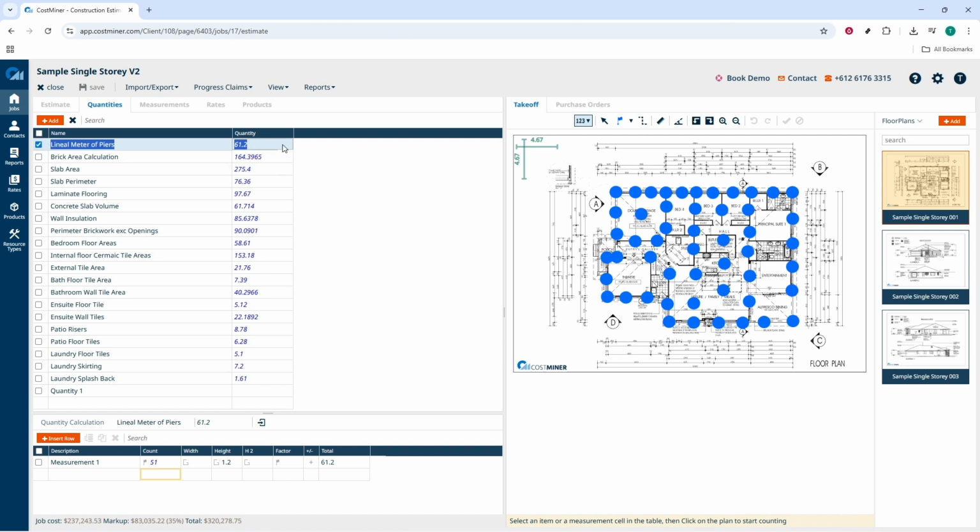Make edits inside the duplicates only. Never touch the base estimate. It should remain your clean benchmark for future copies.